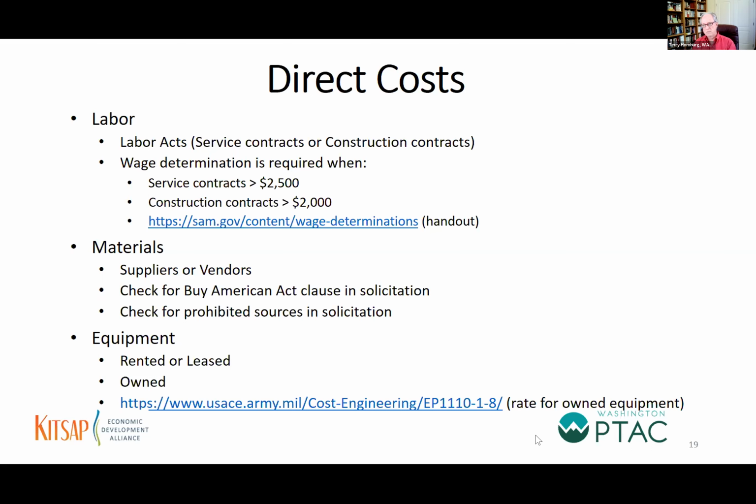It is common, and I've administered many construction contracts in my 29 years, where my contracting officer representatives, construction managers, and engineering technicians go out into the field, onto the work site on a daily basis, and see the progress on the site. A contractor may have put in some materials and there's a tag on there that says made in China, and in the contract, it was prohibited.